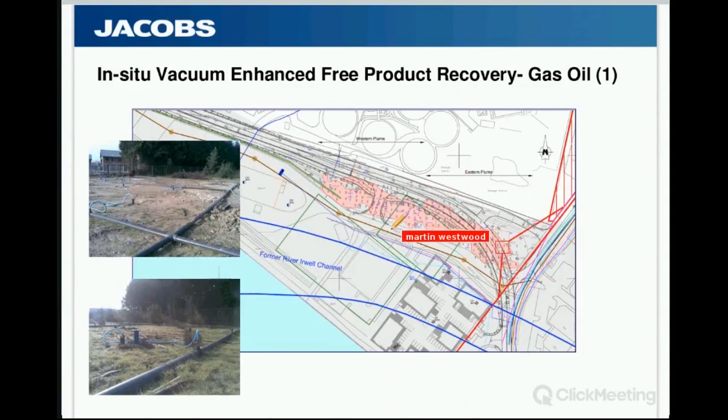What's on the screen is the final extent of the plume. When we went into the project, we just thought the plume was what's described as the eastern plume, and the additional delineation was bundled up within the remediation package. In retrospect, doing it in situ was the best thing that we ever did, because if we had gone for the ex situ method, that excavation would have been absolutely enormous, and abutting the adjacent sites, would have required temporary works and suchlike to support the sidewall excavations. So I think it was quite a happy coincidence, really.